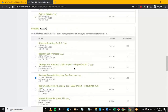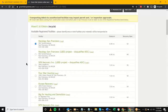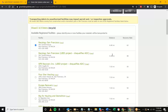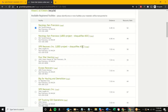Going back up to the C&D, we could use Recology SF as an example — closest to the project site. Notice the recovery rate: Recology SF, if you're including the ADC, the most this project could achieve for C&D loads is 62%. So a project like this needs to source-separate materials. If I had only specified C&D and only Recology, I wouldn't be meeting the municipal requirement of 65%. If the requirement were 75% — especially for a LEED project disqualifying the ADC — I'd definitely need to source-separate more materials.